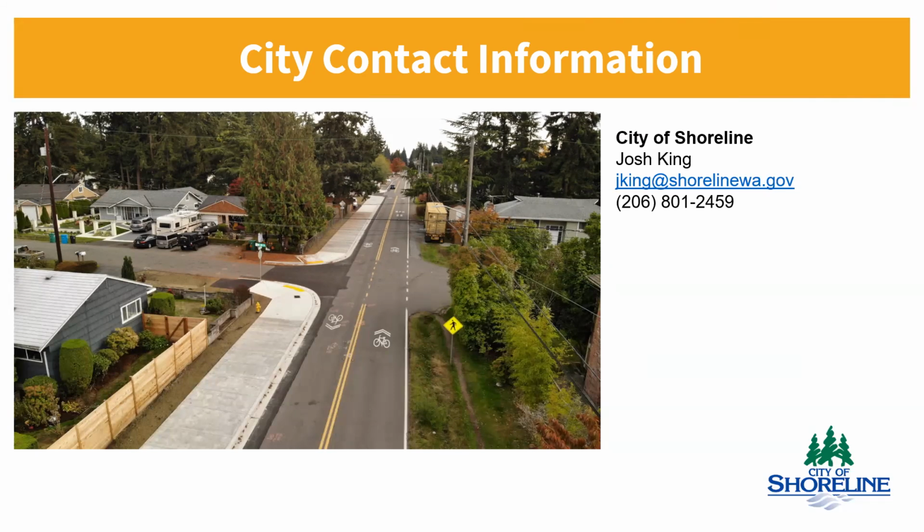Well, I know that a lot of the parcels to the south that are already under development already have plans to produce and construct that sidewalk. But as far as anything that hasn't already gone through the preliminary stage, you might have a little more insight than I do. To answer your question, yes, we do require frontage improvements as part of redevelopment activity. Depending on timing, we would either ask the developer to build the plan that we have designed, or we would ask them to pay a fee in lieu in some cases. We have set up a structure through our municipal code where, if the timing aligns and we have an existing capital project, we can ask them to contribute to our capital project that's about to hit the streets.